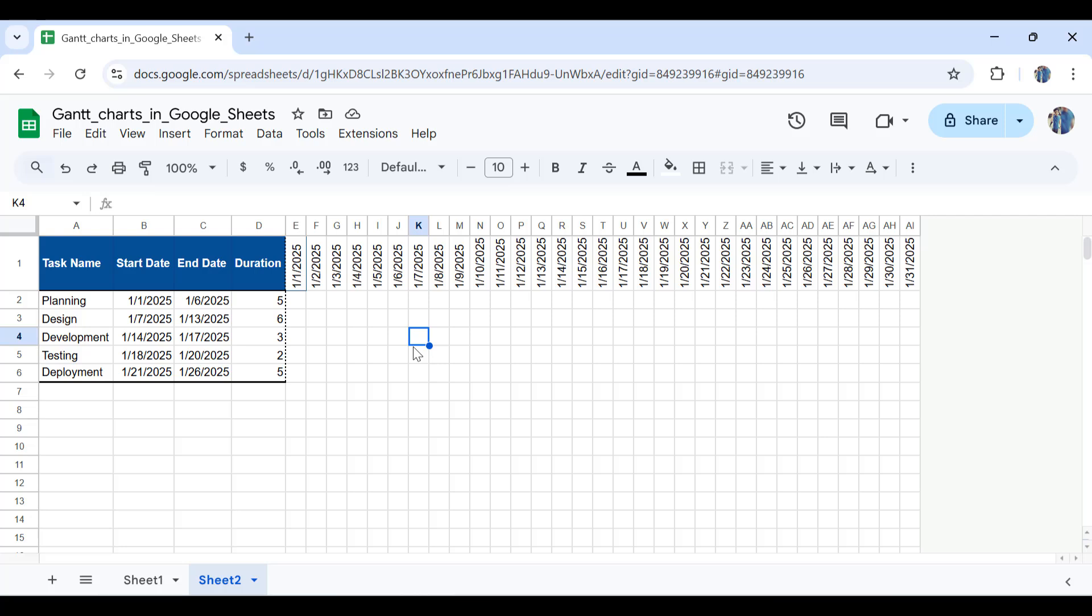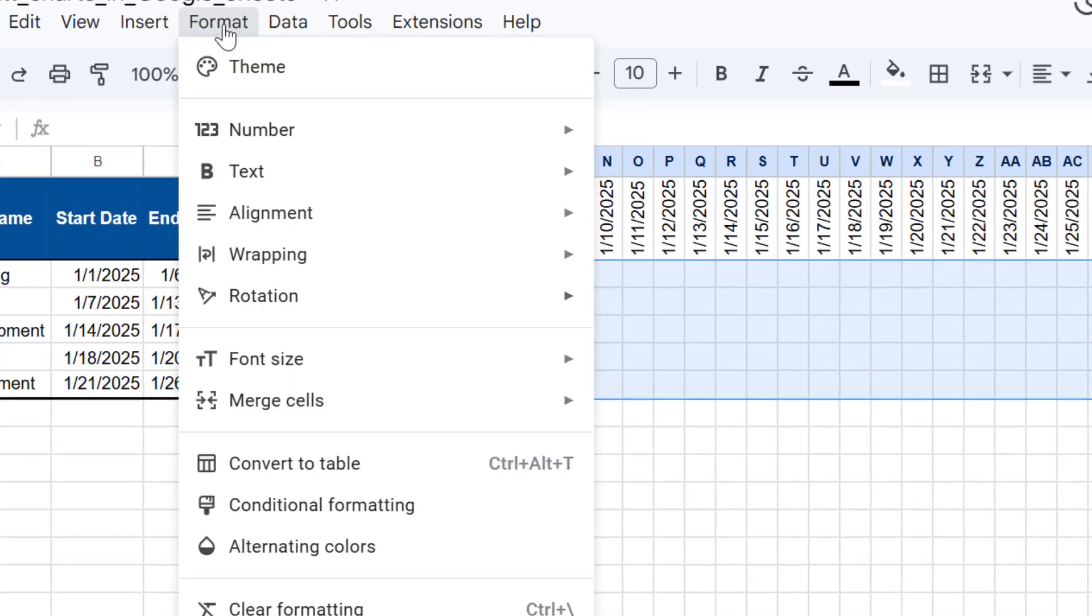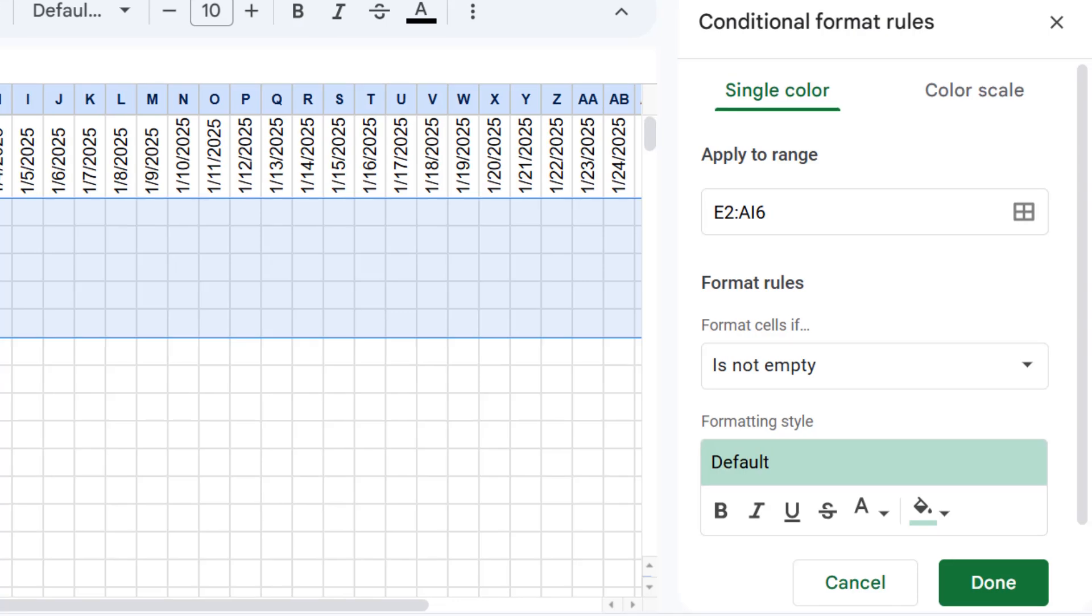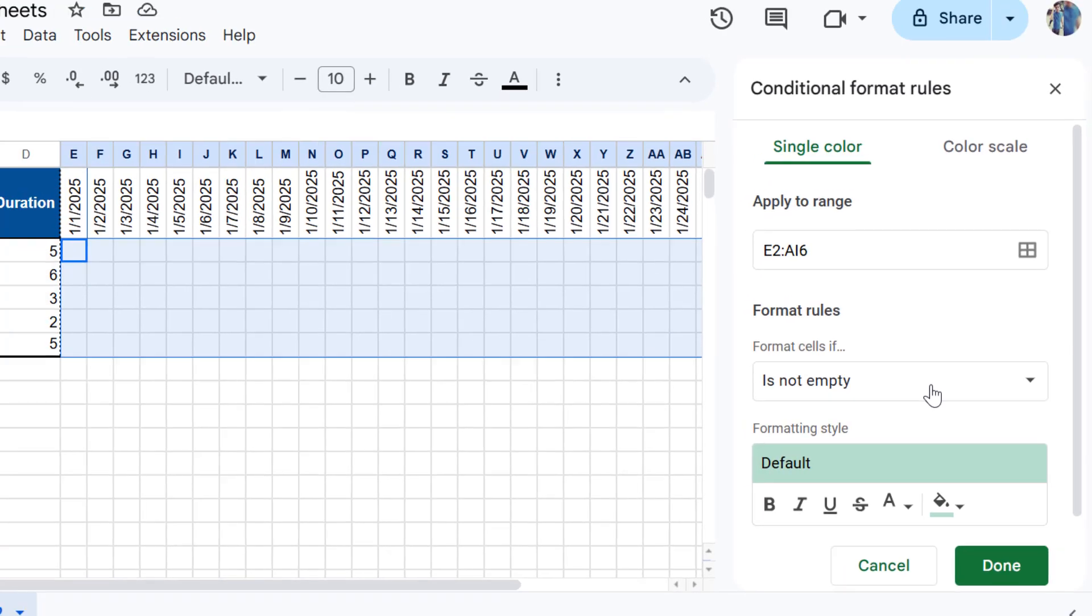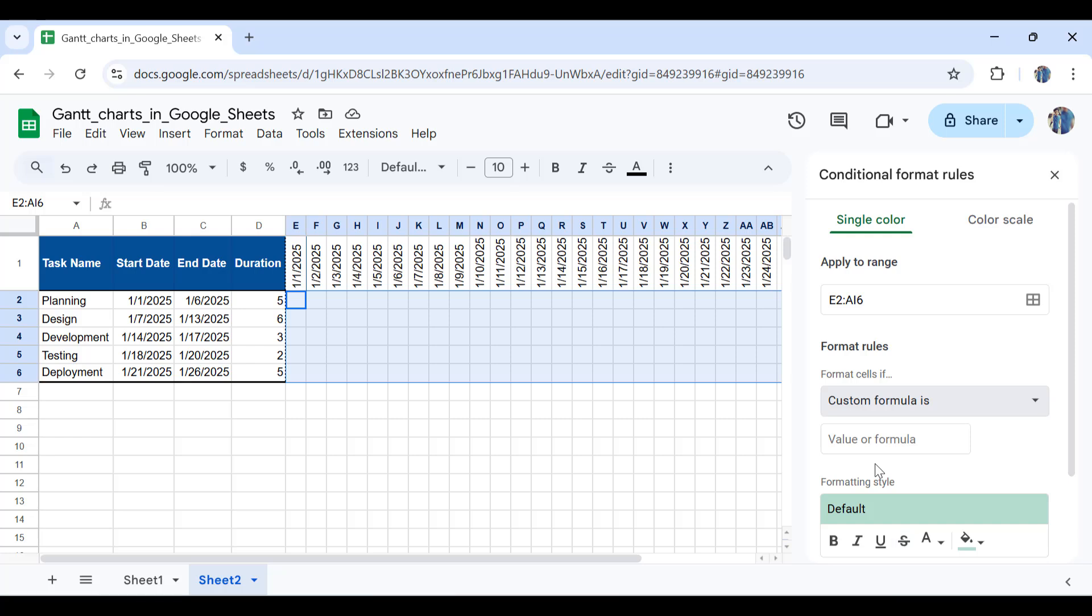The next step would be applying conditional formatting to create your dynamic Gantt chart. I'll select the whole timeline from here up to here, which is E2 up to AI6. Then I'll go to Format and go to Conditional Formatting. The rule should be a custom rule. In order to correctly apply the conditional formatting, we need to see at which points these dates and the dates for the start and end overlap with each other. That's why I'm using an AND function.